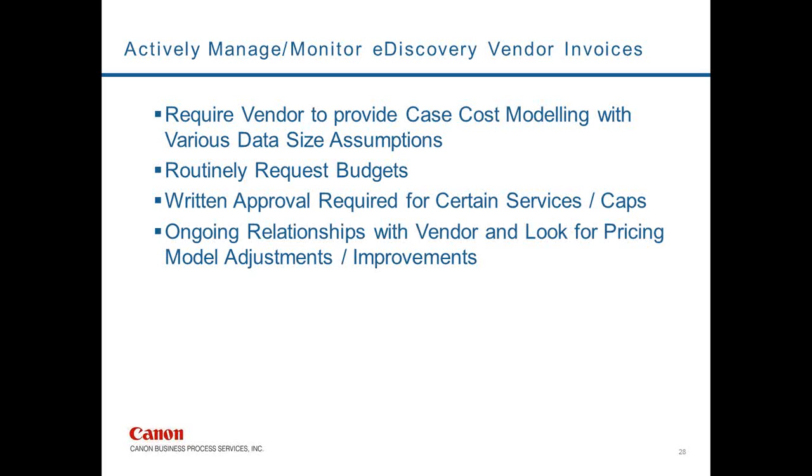So what you want to do, especially upfront, is require your partners to provide you with cost modeling. And we just showed you one that we worked on for the multi-party litigation.